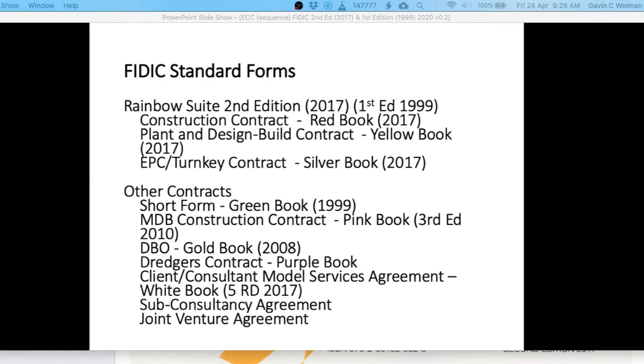There is a gold book used where the contractor designs, builds, and then operates the facility on a commission to pay back the private sector funding he has provided, and manages the contract often for 20 years. It could be gold book, a greenfields development project. It could be, I believe there's a new platinum book, or at least talk of one, where they will use what's called a brownfields or refurbishment type project, using a design build and design, upgrade, fix, refurbish, and then operate